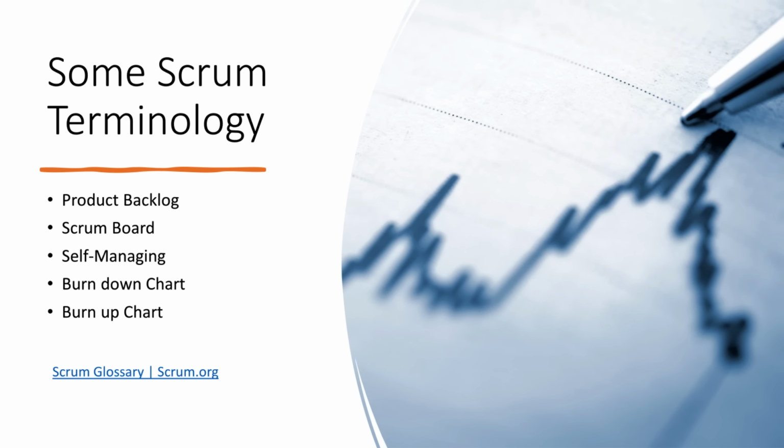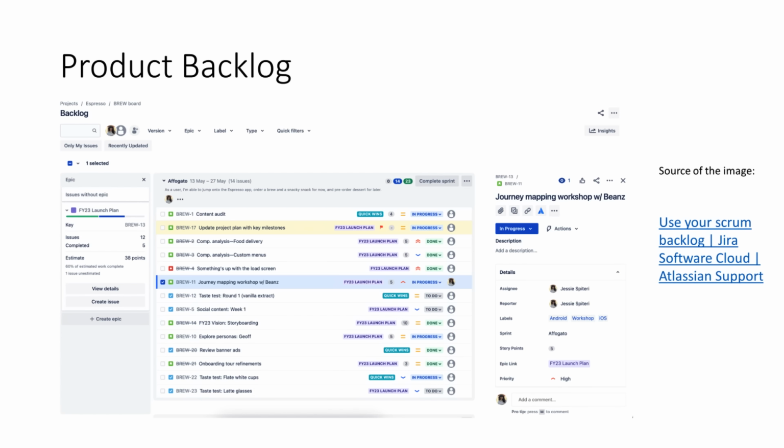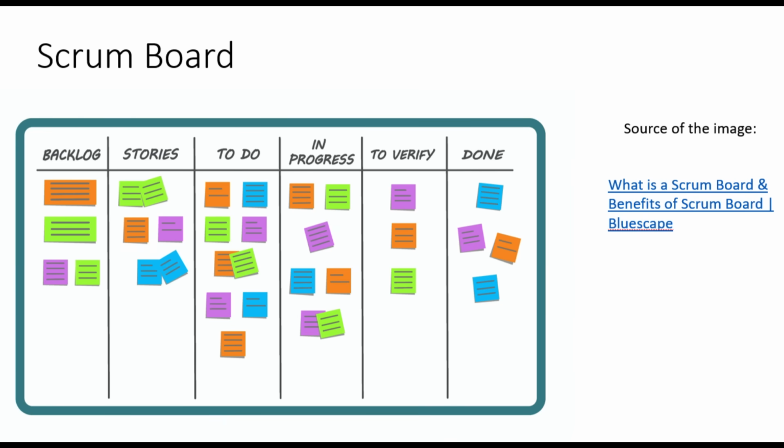Product backlog. Product backlog is a Scrum artifact that consists of an ordered list of the work to be done in order to create, maintain, and sustain a product, managed by the product owner. Scrum board. Scrum board is a physical board to visualize information for and by the Scrum team, often used to manage sprint backlog. Scrum boards are an optional implementation within Scrum to make information visible.